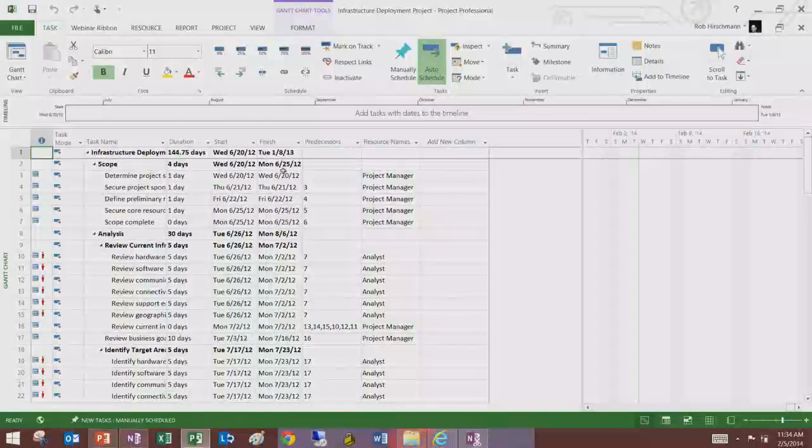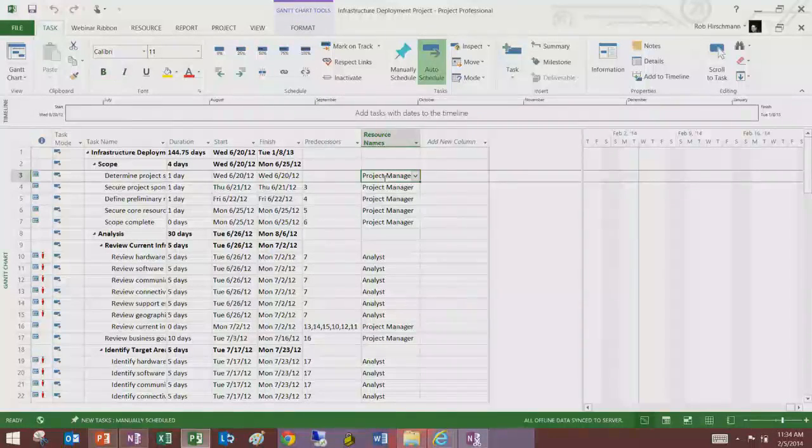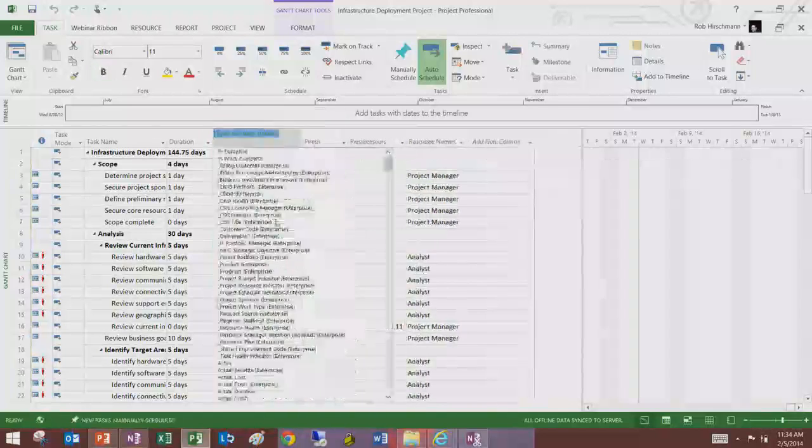But then we're in our schedule, and that's where we've got the roles that map up to the FTEs. We say we've got a project manager, we've got an analyst, we've got a team member. Now we want to do the actual assignments. And this is where we can do the soft and the hard booking of the resources. Now the PM is given the resource, and they go in and they forecast the workload. So let me just insert some work here.